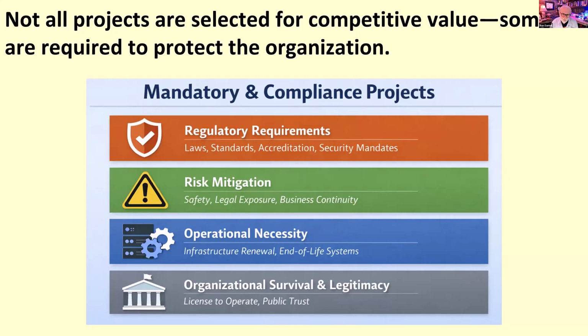Mandatory and compliance projects are there because the organization must do them for some reason. Regulatory requirements, things like safety obligations, critical system replacements may leave us no real choice. So the decision is not whether you do the project, but how and when.